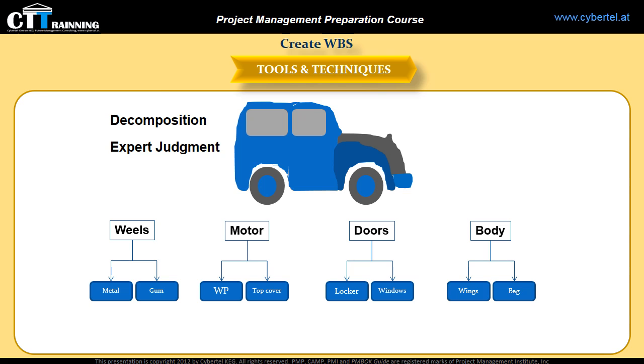Each organization might have its own form of WBS structure, such as a structure that uses the phases as the second level of decomposition, and the product and project deliverables as the third level. And other structures use the major deliverables as the second level of decomposition. Also, there are structures which incorporate subcomponents like outsourced work, which may be developed by an external organization, such as contracted work to produce a part of your deliverable.